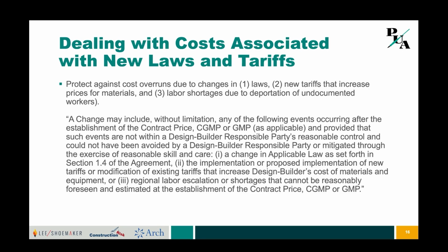So this clause that we have here is a way to say, look, if the costs go up for these unforeseen reasons, then you're going to give us a change order. You're not going to hold us accountable. So this is just one clause that I've seen, and I've been asking project owners to include this in their contract. Just an idea. As an additional thought, we're seeing a lot of contracts where the owner is baking into